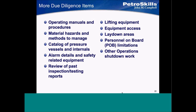Some are offshore-specific, like POB or personnel on board. But these are things you really have to look at: operating manuals, procedures, material hazards and methods to manage, what do the internals of a vessel look like, alarm details, passenger inspection and testing reports, lifting equipment — what kind of lifting equipment do we need and do we have access? Lay-down areas — where can we put pipe spools that have been fabricated or a vessel being replaced? And for offshore, POB — do you have enough beds? Very critical.